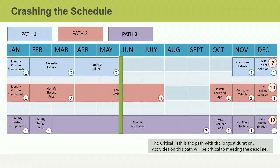You will continue to approach the final project activities, which are on the critical path. What exactly would you do to crash this activity and compress the project schedule? If you suggested adding resources to the develop application activity, you are correct.